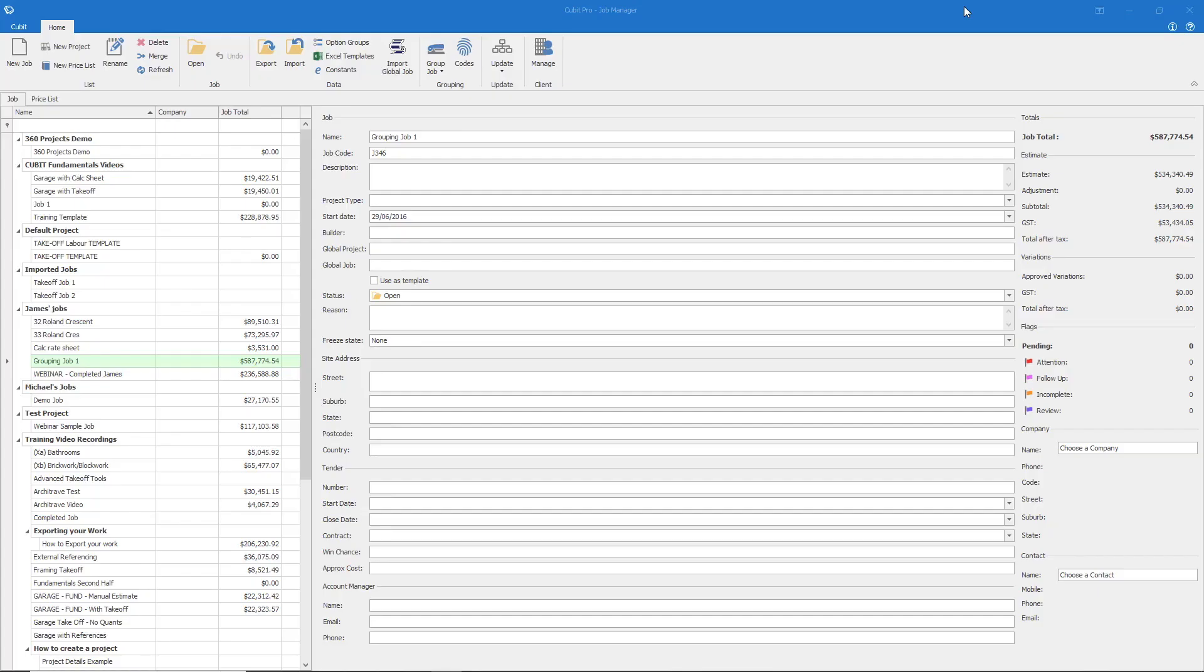Coding can be utilised to get a subset of information. It enables you to reorganise your data to represent it in a new view. Coding could even be utilised for the purposes of project management, for example, who does what job or at what stage of the build this will occur, or to modify your estimate so that it can be interpreted by third-party software for different purposes, such as accounting.